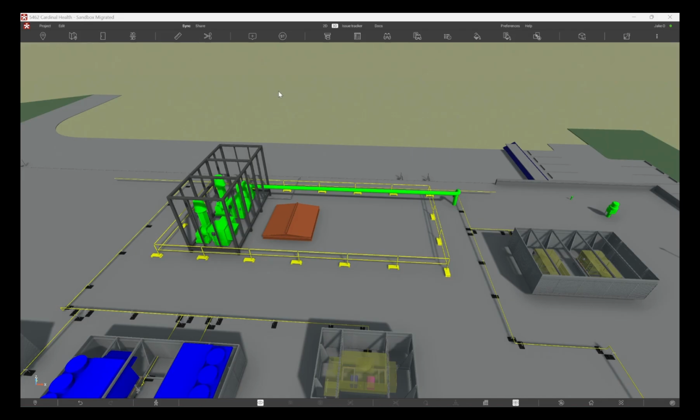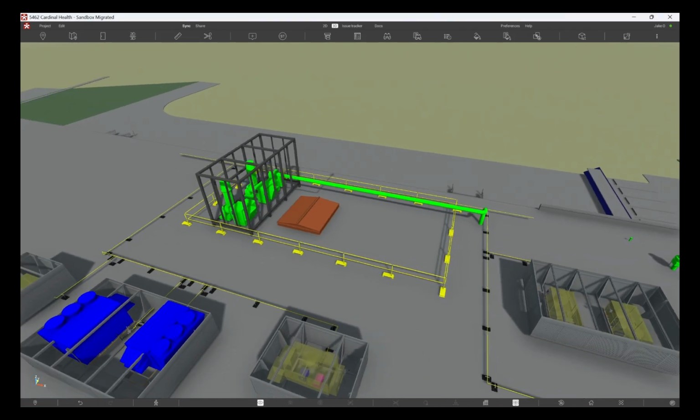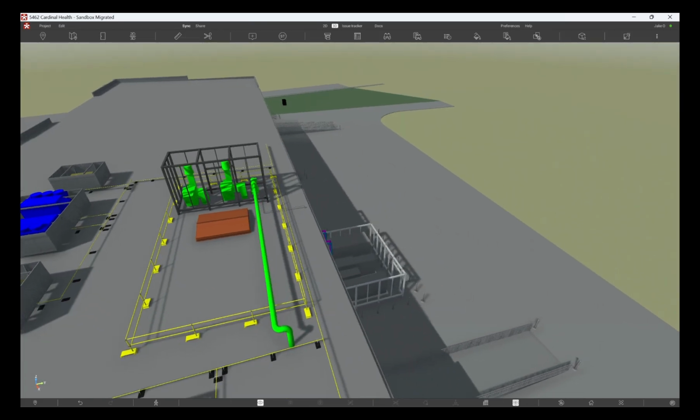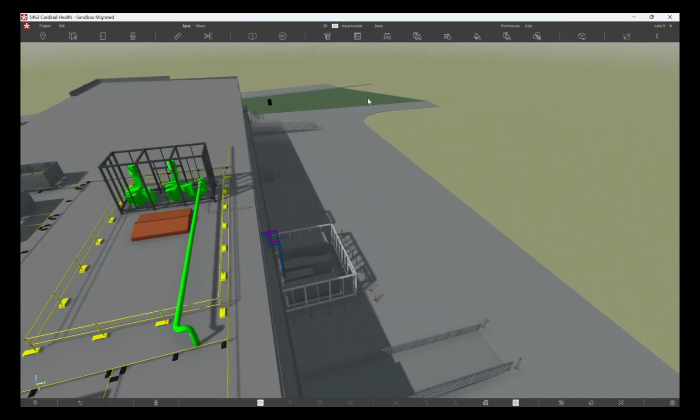project. I'll kind of give you a simple rundown of what we're going through here before I show you an example that we got on CM Builder. So we're going to have our crane coming around this back area here and doing the crane picks for the RTUs back on this side of the roof and the cyclotron machine through the roof hatch. But throughout the two demos I did with CM Builder, I was able to discover it's a really great tool, and they were able to help me create this demo scenario.